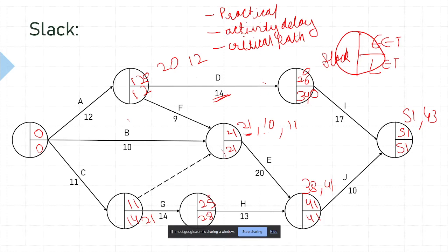But just before, you added one extra excavator, that can be done with the critical path method, no? Sir, if we hire one extra excavator but the number of dumpers is less, the excavator will be free because there will be no dumper to fill. So for that we calculate the critical path method. What is more critical? According to that, resource scheduling is done in practice at site. So the resources are being diverted and utilized. Okay, so Slack helps in improving resource utilization.